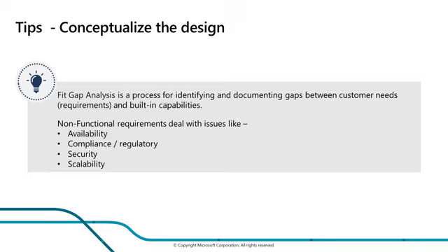So my additional tip here is, in the governance of the project, please think about the glossary, just to make sure that you talk about the same thing using the same words, because it's so easy to use the same words sometimes to talk about different things, especially when it comes to very specific topics like security.